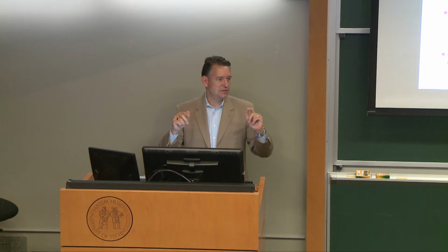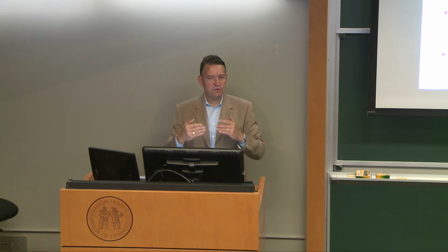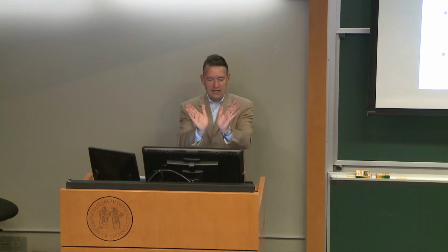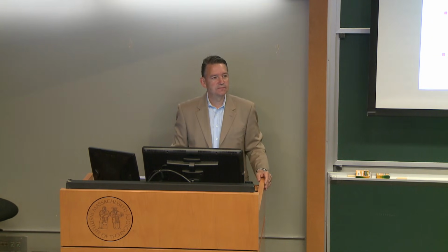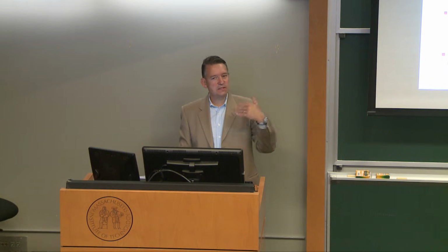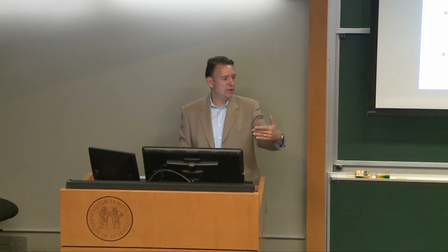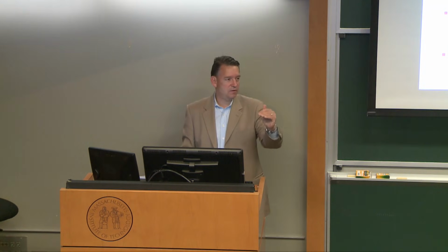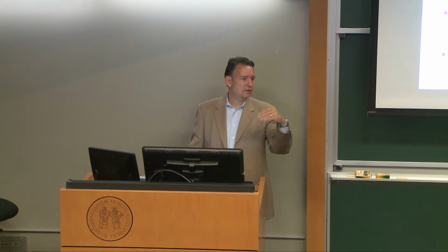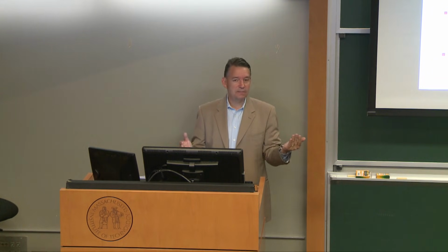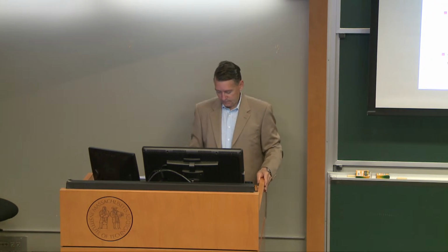You have to make some design decisions, and then once you've made those design decisions, then you can actually write your level 2, level 3 requirements and so forth. So it's an iterative process. When you look at the classic V model, you don't really see those iterations, but they actually exist. So what we typically do at this system requirements review is review and then agree on the high-level requirements, level 0, level 1, maybe level 2 requirements, but not the lower level ones, because you typically haven't done the design yet, right?